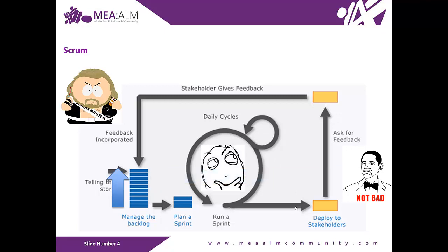Now, every now and then, the three actors will have a meeting called a sprint meeting. A sprint is an iteration. You can just call it an iteration. And the duration of that iteration or that sprint ranges between a week to a month. But you want to keep that shorter so you can plan it well. So in that meeting, they decide based on a priority list which user stories will be implemented for that sprint.